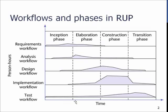The idea behind the Rational Unified Process is that there are workflows and phases. The phases are basically something from the Waterfall model, but they actually aren't, because on each phase there are different workflows for different activities like requirements, analysis, design, and implementation. So in the Inception, the first phase, the idea is that we do requirements work.